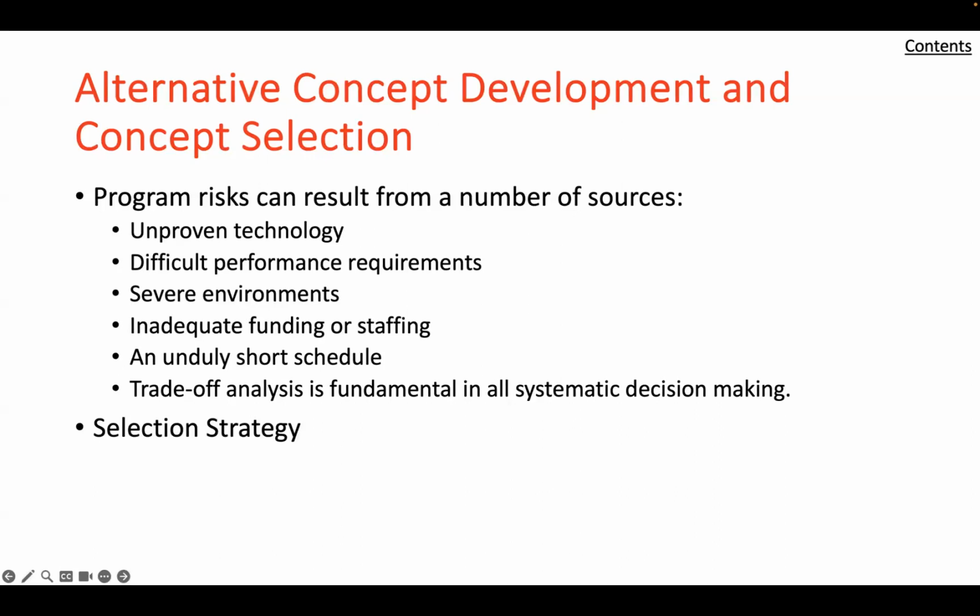Two, if the number of alternatives is larger than can be individually evaluated in detail, perform a preliminary comparison to winnow out the outliers. This is equivalent to qualifying the candidates, but be careful not to discard prematurely any candidate that presents a new and unique technological opportunity unless they are inherently incapable of qualifying.